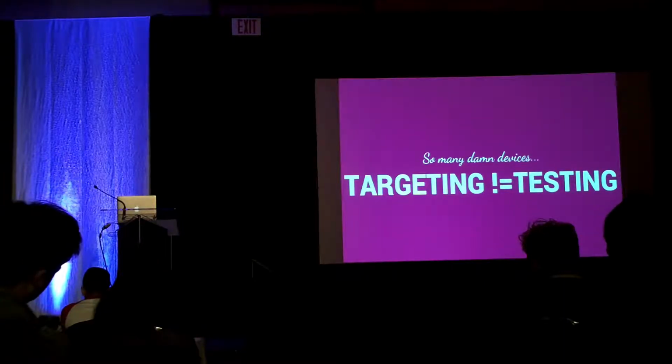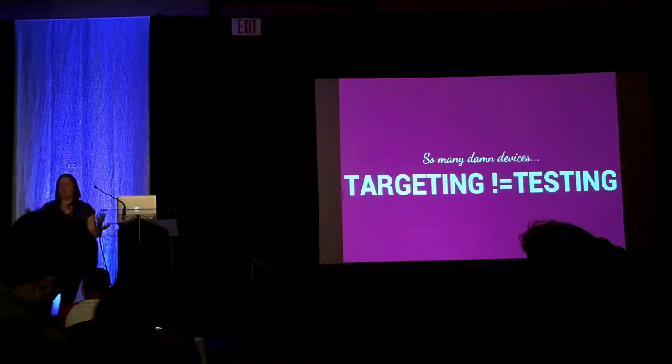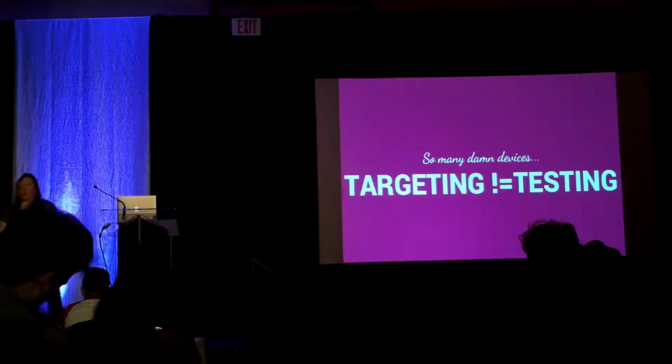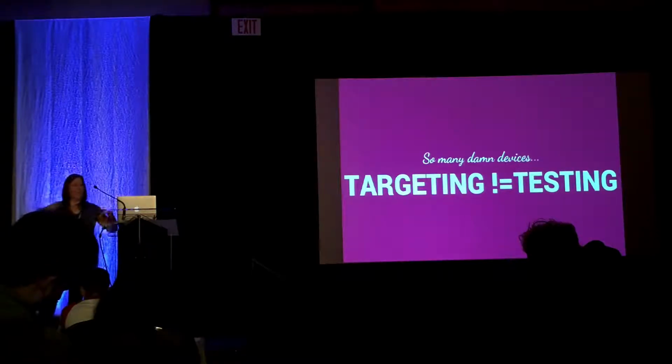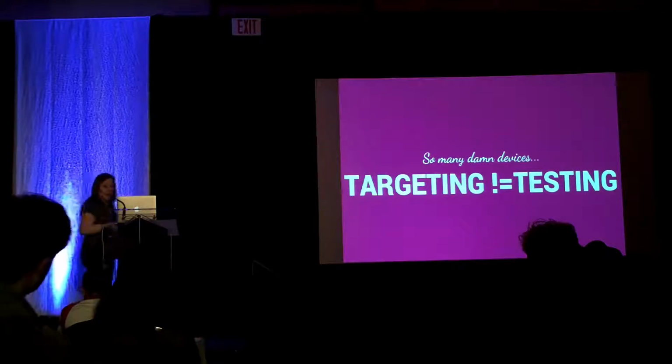Like, you can't be like, I have an iPad, this generation with this OS that hasn't been updated, that has this version of Safari. You can't do that. It becomes really unrealistic, right? And so you start to figure out what browsers you're actually going to support and you're going to optimize for, meaning like, where is the experience going to be great versus where are the other ones where they're outliers? And what does that mean in terms of your contract, right?